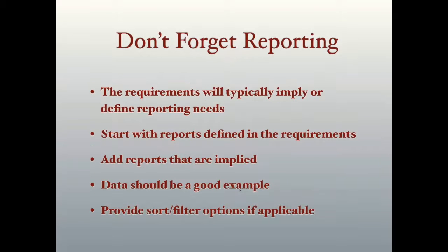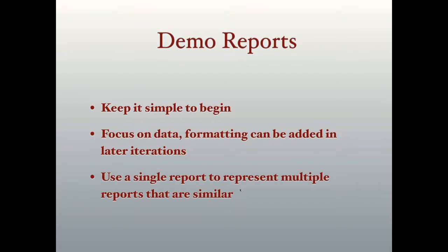If you have additional time, great, you can pretty it up a little bit, but remember, formatting in particular, drop it. Do not bother spending a lot of time on formatting, because one, they're going to pick a whole different font, format, or colors, and two, formatting is an 80-20 rule easily, where the last 20% easily takes 80% of your time.